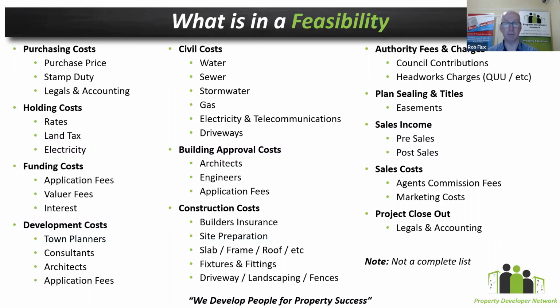I do everything humanly possible to never ever spend it, in which case if I don't spend it, then my deal becomes more profitable, just in the fact that I didn't spend the money. And so when you're looking at it that way, it makes it much easier to compare the profitability of a deal. Please don't ever consider contingency as a form of profit that's not yet spent.